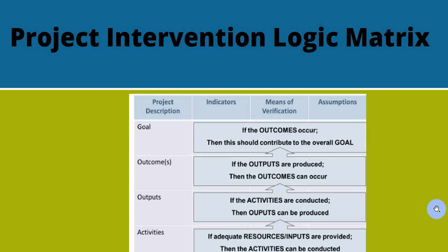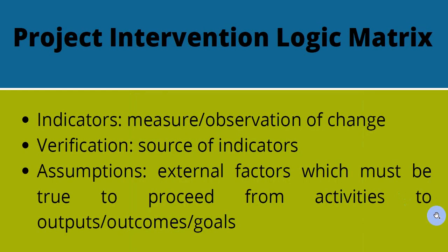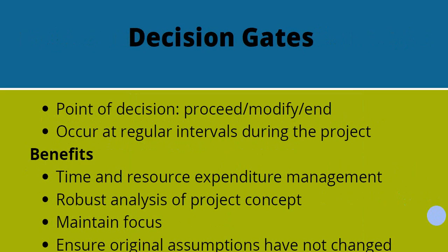And finally, let's look at the concept of decision gates. These are points of decision during the life of the project when we decide to proceed with the project as originally planned, modify the project, or in some cases end the project. These will occur at regular intervals throughout the life of the project, and there are several benefits to the concept of decision gates. One benefit is the management of time and resource expenditure.